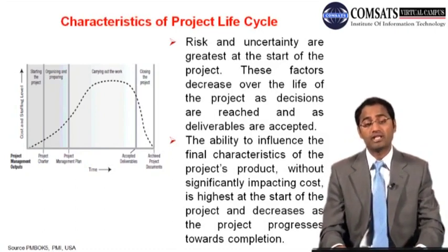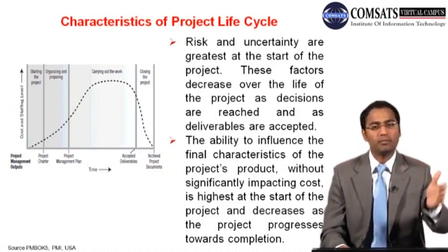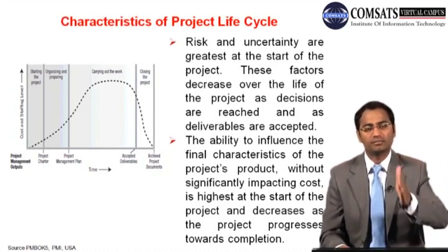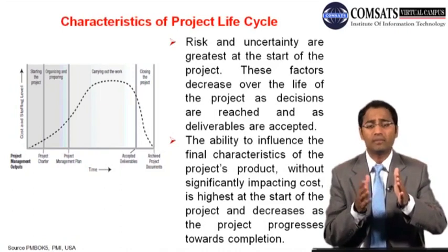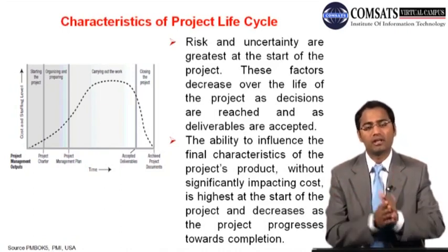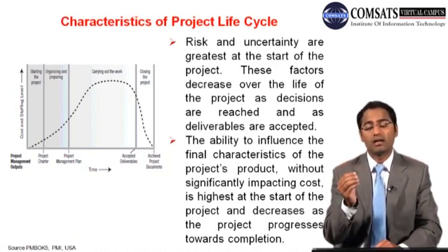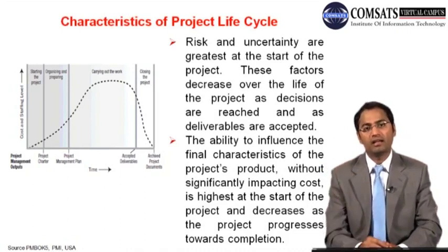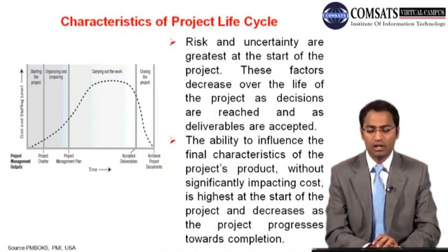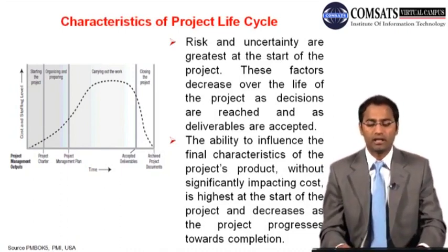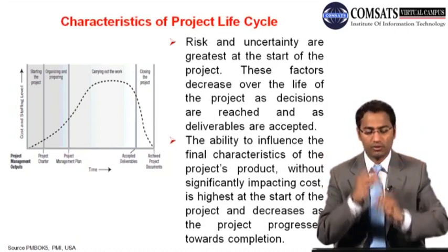And there are a few risks which were documented early, and they were associated with the planning phase, and the planning phase is getting to closure, and many of the risks have not surfaced. So you strike them down. And there was a risk about a volatile stakeholder at site, and now your execution is at the top and you haven't identified that person around, so there is a lesser probability. So what you will do is decrease the probability of that particular risk.